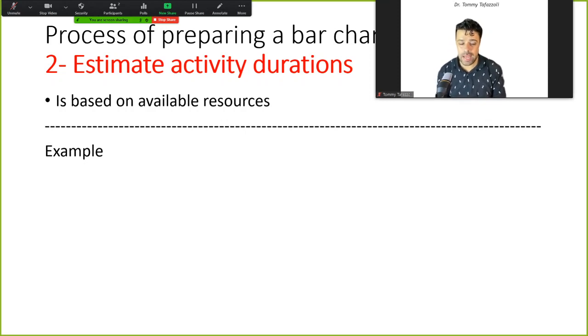So next time they have a basis of comparison, and by comparing the quantity of this job with the job they have done before, they can find a very close number for the durations. They can estimate the duration with high precision.